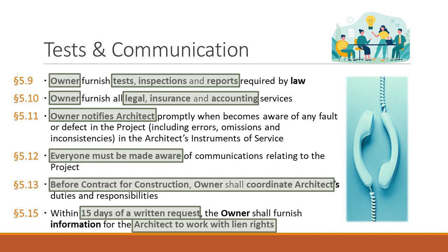Now, the interesting thing about that is, if the owner doesn't speak up, if the owner becomes aware of a fault or defect and doesn't say anything, does that mean the architect is off the hook? Hey, you didn't tell me it was wrong? Well, that doesn't mean the architect is off the hook. The architect always is responsible for designing in accordance with the standard of care, which means following all laws and codes and otherwise. So, if the owner doesn't know and doesn't say anything, it's all the architect's fault.